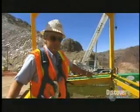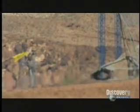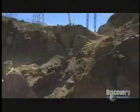He needs to be certain that the concrete will make its way safely through 820 feet of piping in searing ground temperatures of over 113 degrees Fahrenheit. It's a critical part of the project, and it makes it a little more difficult here because we have to run our concrete slick line all the way down, and vertically we're dropping a good 300 feet.